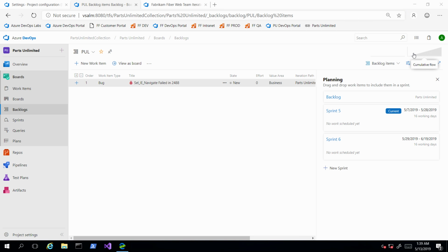If it is a discussion of different team projects within the TFS or Azure DevOps context, then basically no, you'd have to replicate them, and then the context would change because you've got this boundary of the team project. They would need to move into a different team project to be able to see that.